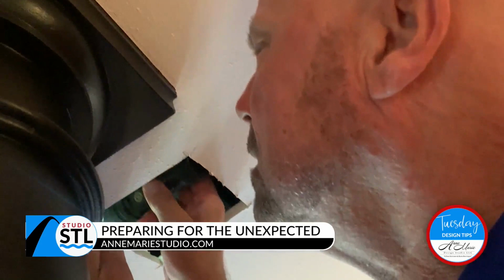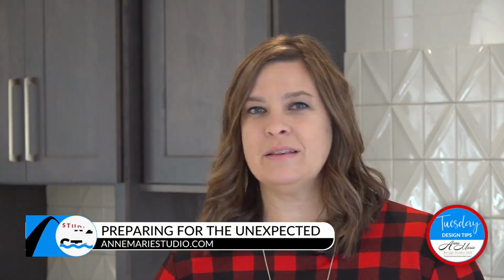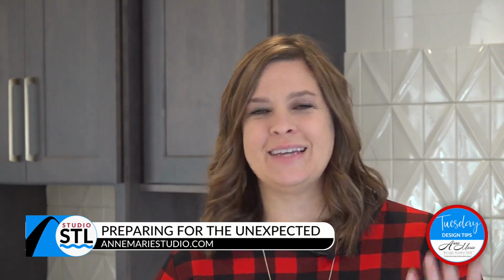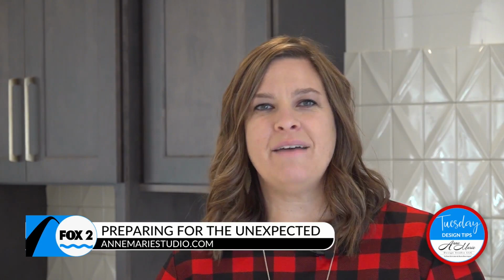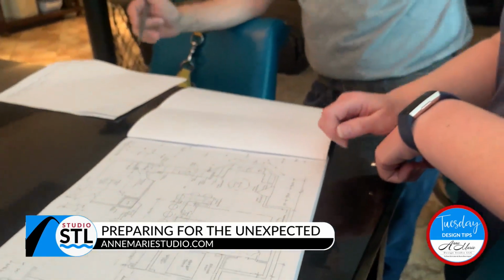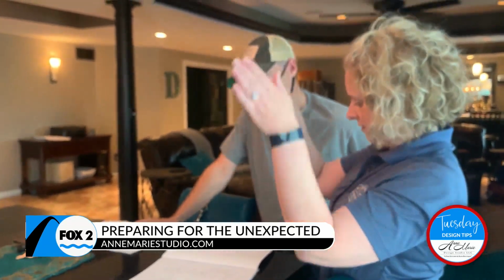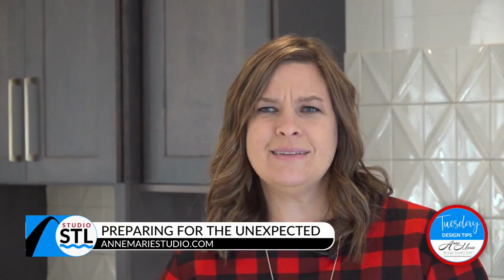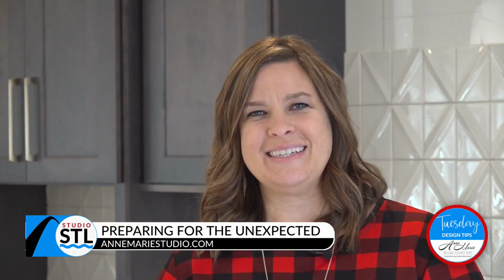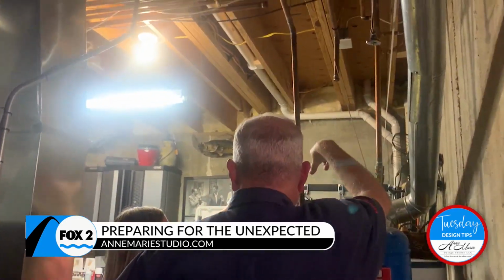So on a job site, we try our very best to not have any unforeseen things come up. Sometimes we get in there, we rip out the walls or the ceilings, and we see, oh my gosh, there's a gas line right where we don't want it to be. So things like that can come up. We have the trades, the ones that are the best at their jobs, come in and tell us what the options are at that time, and then we'll go over that with the client and get a good feeling of what's the best decision to move forward. Sometimes it just works out really simply. Sometimes it's a little bit more confusing, but we try to work with what's easiest. Taking even the trickiest of situations and turning them around for their client's good.